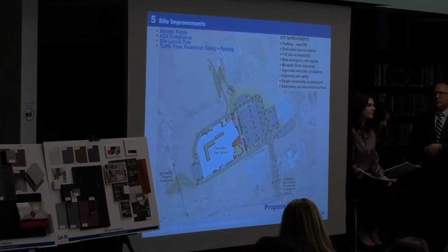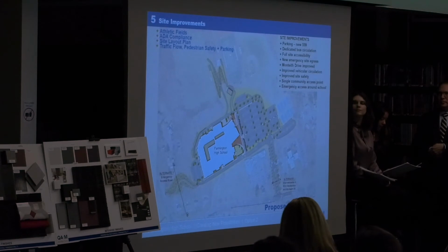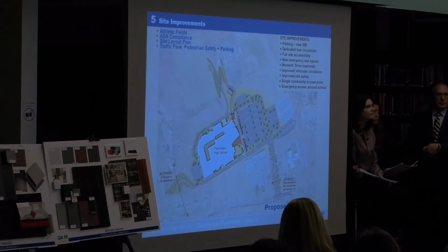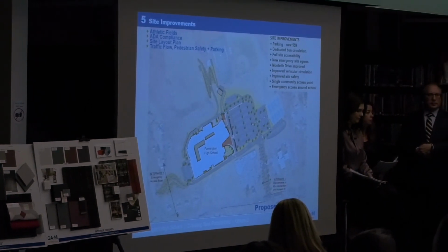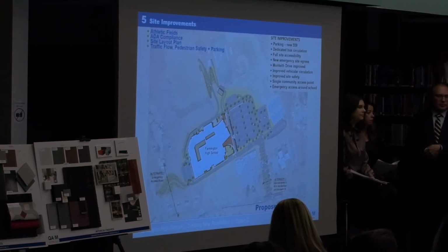And then our scheme also includes this little wagging tail there, which connects the school down to Highwood Road. That's, as Rusty mentioned, important in this scheme as a construction entrance while we're building that first piece of the project, and then long term as a safety element to be there.